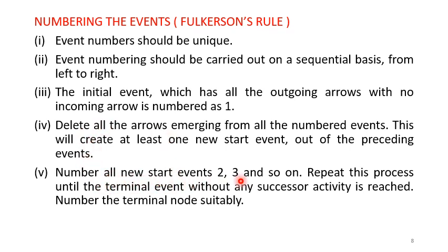Number all new start events 2, 3 and so on. Repeat this process until the terminal event without any successor activity is reached. So the initial activity will not have any preceding activity. Similarly, the last activity will not have any succeeding activity. So number the terminal nodes, that is the end nodes, suitably.